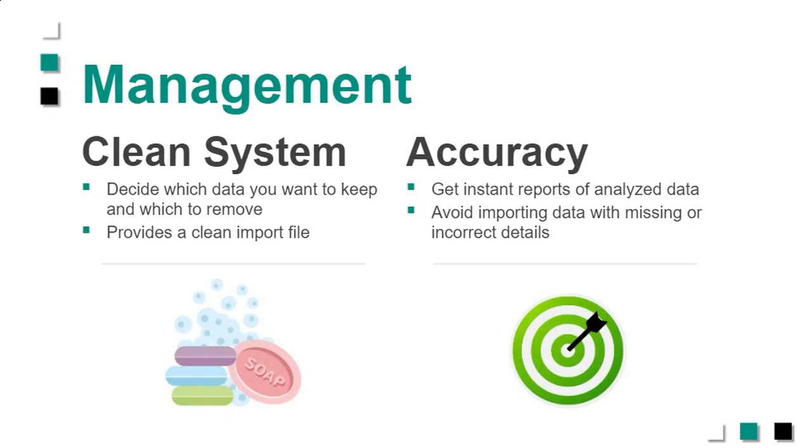You don't want your calendars colliding. That can change the way the schedules actually show up. And it could also make you waste a lot of time trying to figure out why you've got a date that's not matching what the contractor has in their PDF, that sort of thing. So the accuracy, and again, saving time because you don't have any collisions in the way the data came in.